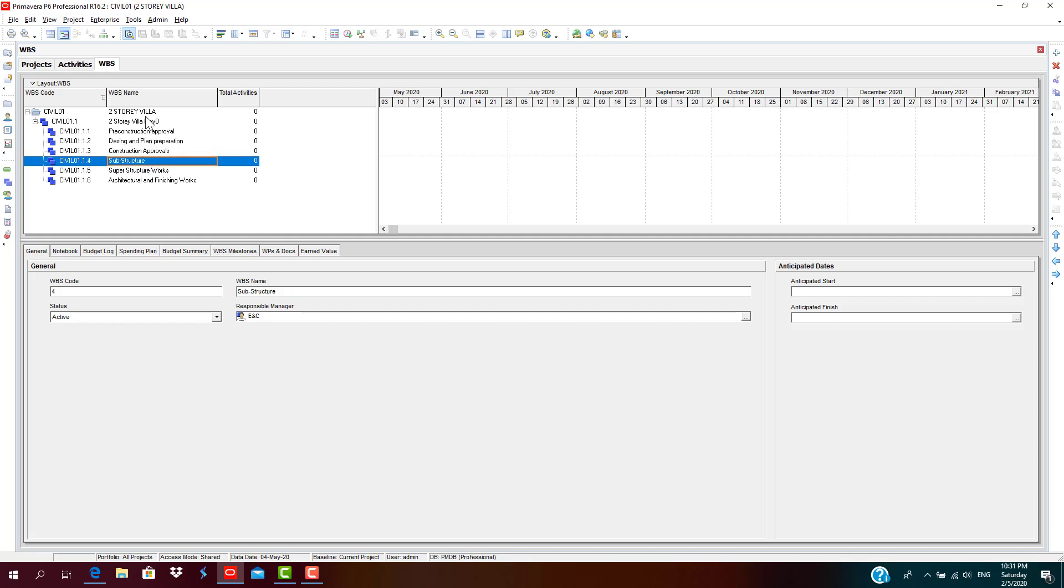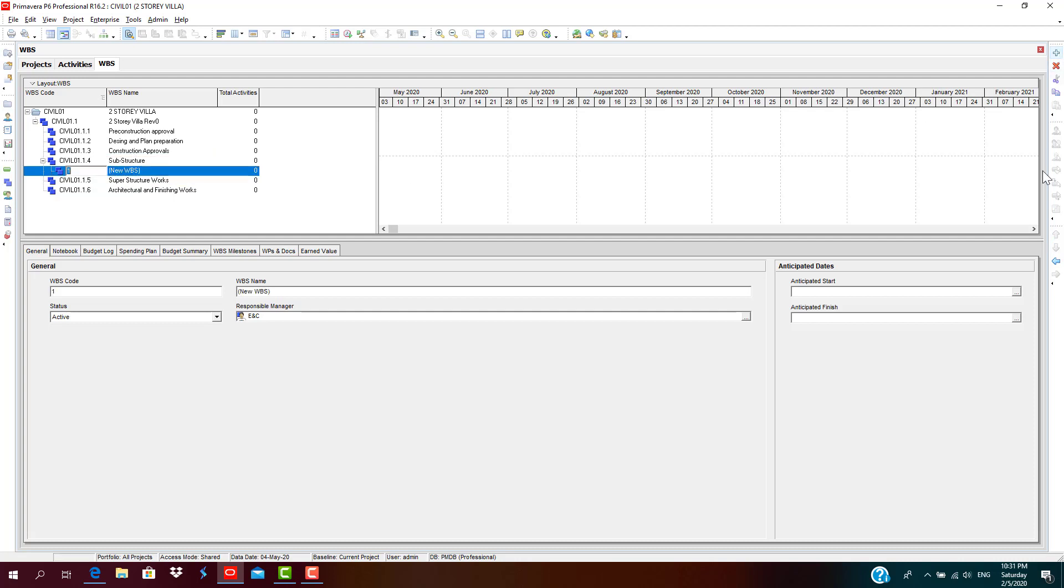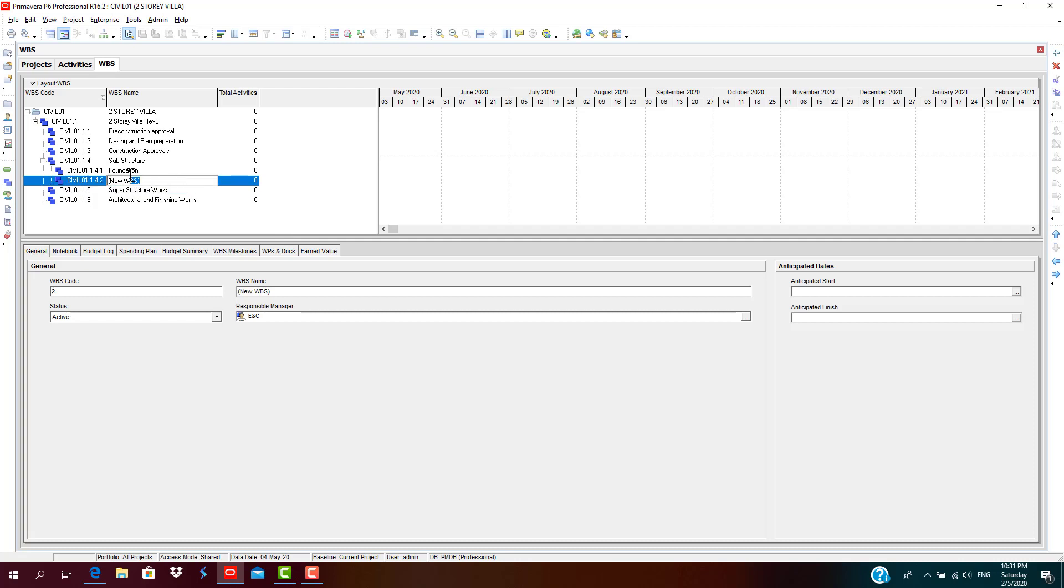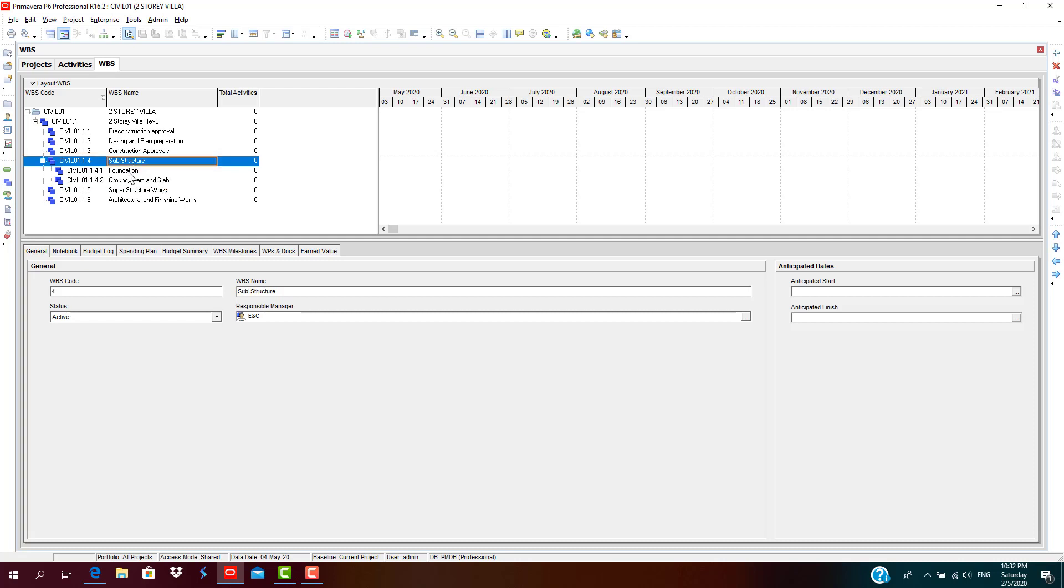We have foundation works and ground beam and slab. Remember, under substructure, both foundation works and ground beam and slab works are part of the substructure, so it is indented inside the substructure, like it's grouped under the substructure works.